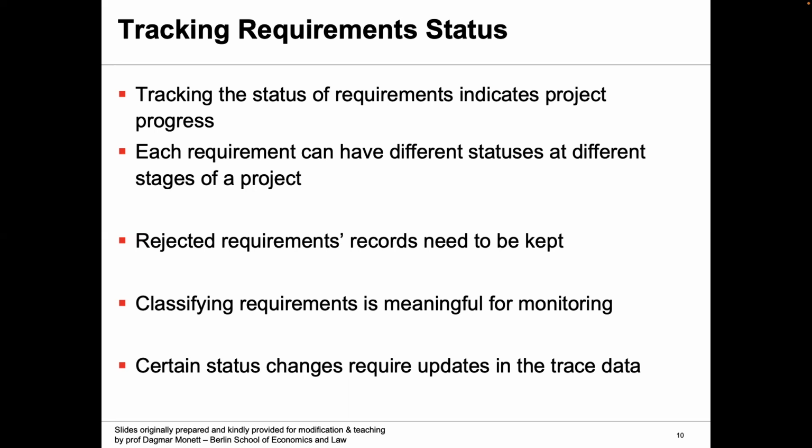Okay, so he says here, again like an example from the book, that if you have a requirements traceability matrix, it starts with basically a copy of your baseline SRS document, and the project manager deleted everything except the updated status of the requirements, as well as the corresponding changes made in the actions that led to changing the status.